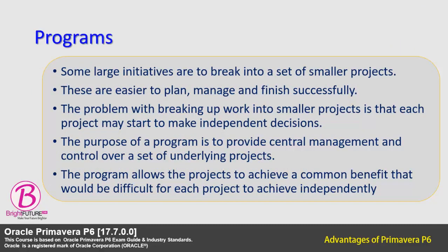Second one, programs. Some initiatives are so large that it makes sense to break them up into a set of smaller projects. These smaller projects are easier to plan, manage, and finish successfully. However, the problem with breaking up work into smaller projects is that each project may start to make independent decisions that will be good for the project, but detrimental to the initiative as a whole.